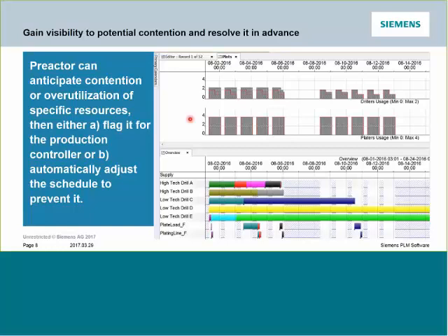So there are a variety of options. At this point, the scheduler may be able to talk to management and say, we want to bring in some operators from another shop or another unit. The production controller said, we can resolve this if we extend the schedule and work some overtime over the weekend. Right now, there isn't anything happening on the weekend. Once the issue is seen, once it's detected, it can be resolved before it becomes a crisis. And there's generally a number of degrees of freedom.